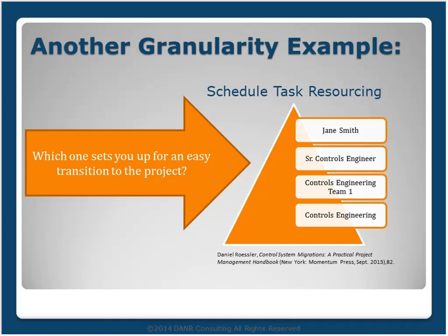So as you transition in the project, being able to plug in your staff and use the schedule that you've already created in the FEL will save you some time. And obviously many times, depending on the FEL phase, you're not going to go into this level of detail in the schedule. But my contention is that if you've got the opportunity to create this level of detail in the schedule, do it as early in the process as you can.